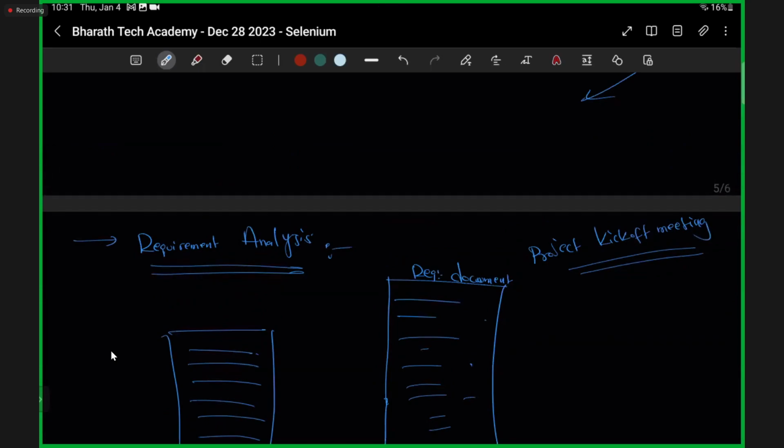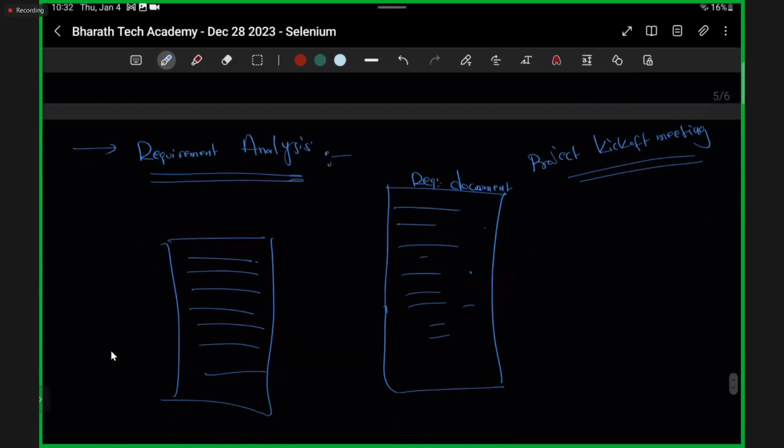And they are going to talk to our client and say, see, team members are asking these many questions, and some of the features that you are requesting are not at all possible to implement because of such and such technical complication. Instead, there are some alternatives the team suggested. So these are all the alternate solutions we have. Is it okay to proceed further with these alternate solutions, or do you want the same feature only? These kinds of negotiations will happen after the project kickoff meeting, because